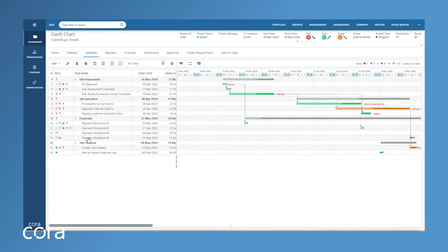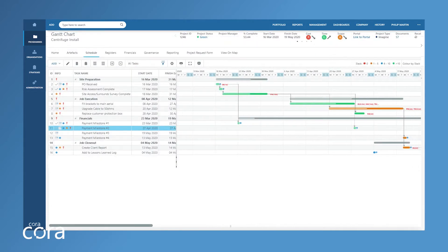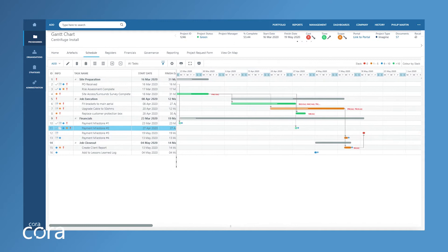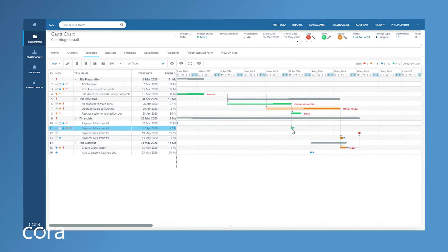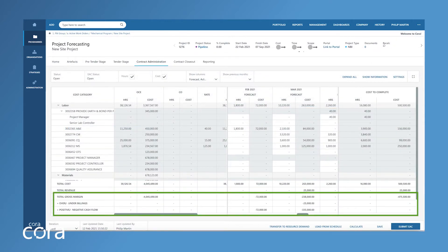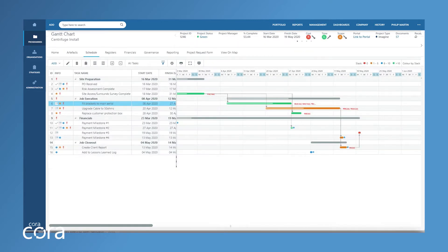She can also easily forecast, seeing revenues coming from the Gantt chart payment milestones filled in by Arthur's project manager, with displays of gross margin figures, under and over billings, and whether or not projects are in negative or positive cash flow. She can also see what tasks need to be completed by looking at the Gantt chart before she sends the client an invoice.